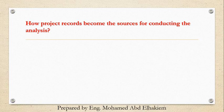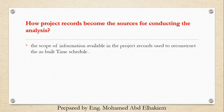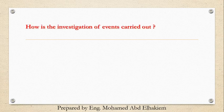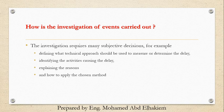How do project records become the sources for conducting the analysis? The scope of information available in the project records is used to reconstruct the as-built time schedule. How is the investigation of events carried out? The investigation requires many subjective decisions — for example, defining what technical approach should be used to measure or determine the delay, identifying the activities causing the delay, explaining the reasons, and how to apply the chosen method.